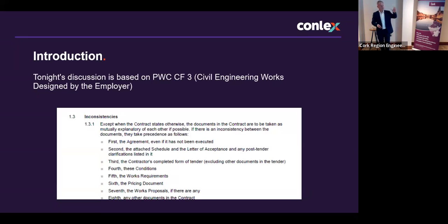It sets out a list of contract documents. It sets out the hierarchy of contract documents. And when you go and look at the list, you'll be surprised where certain documents are on the list. For example, the pricing document is down towards the end, just above works proposals. The works requirements is very much down the list. The schedule is very much high on the list.